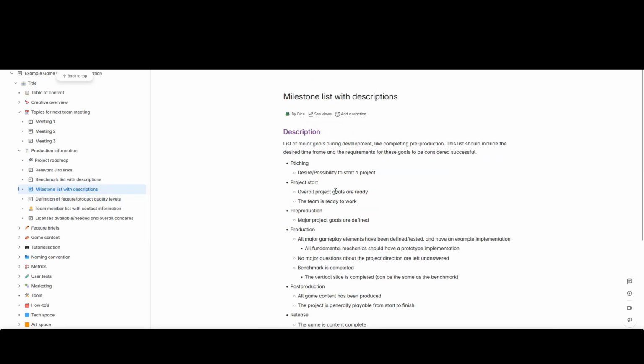This is a really high-level list and not necessarily the same milestones that you will have, but essentially divide your project into milestones, have certain dates for them, and then define what it means for the project to be in that state. And then if you can't manage to do that, you know that something has gone wrong. And again, this is a call for rescheduling all of the plans that you have from there on.